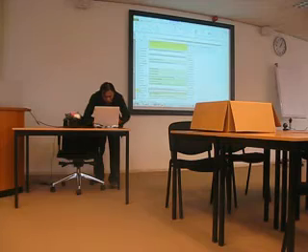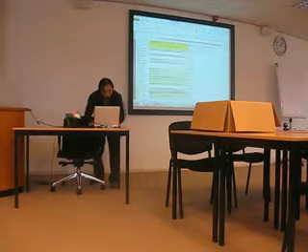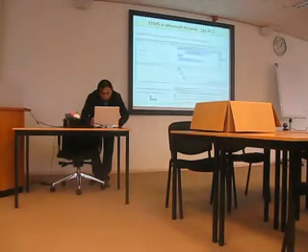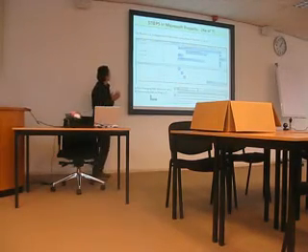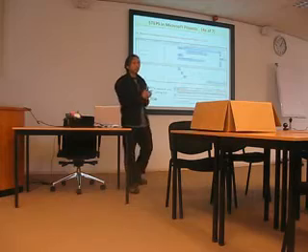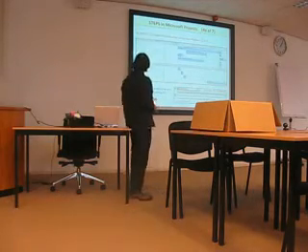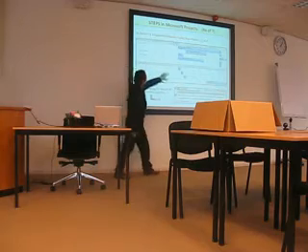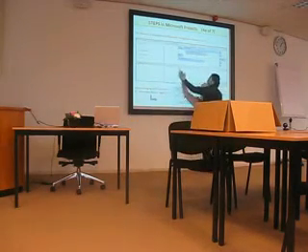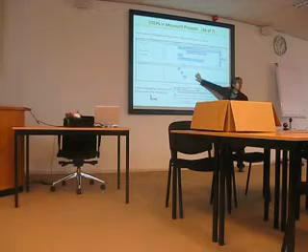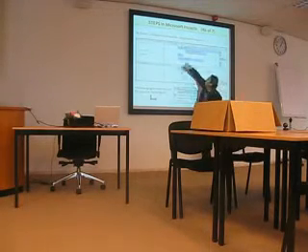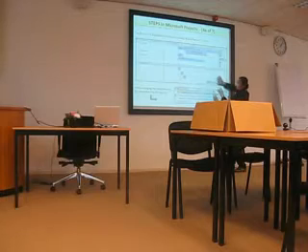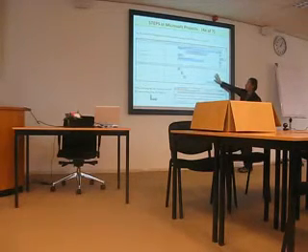Okay, we go back to 50 and it calculates again automatically. And then this is also one of the good features of Microsoft Project. Can you see this? This is unassigned tasks. There is no one in charge of these tasks. We have to move this one to this one. There are 10 unassigned tasks when I did this.